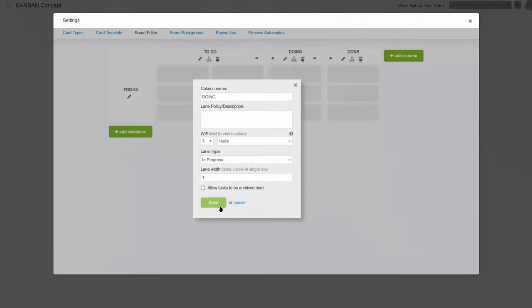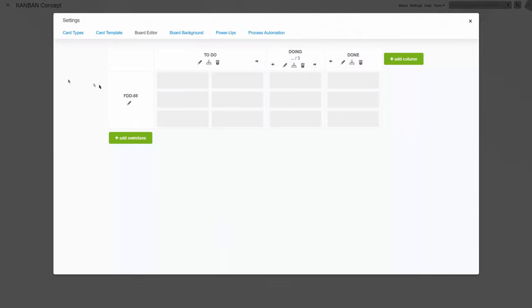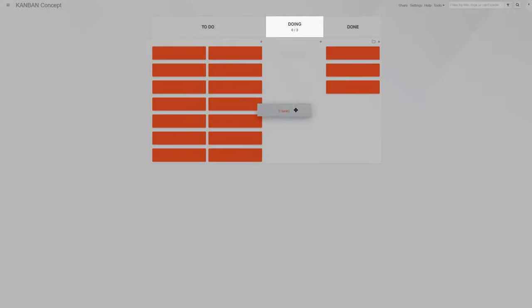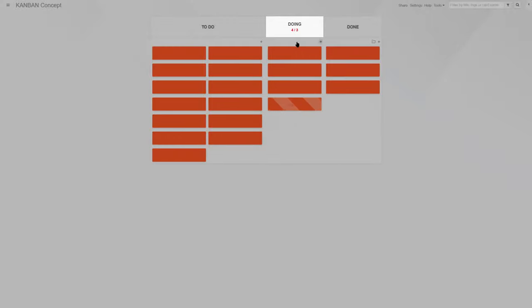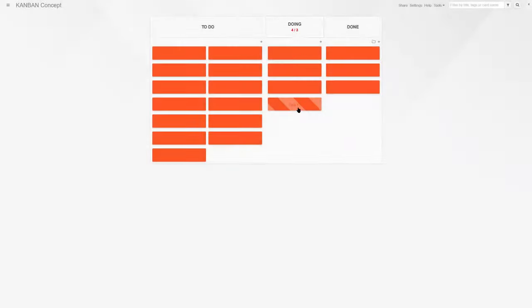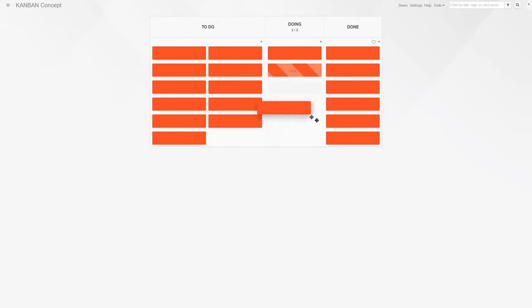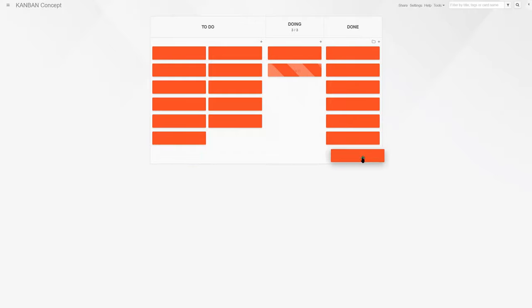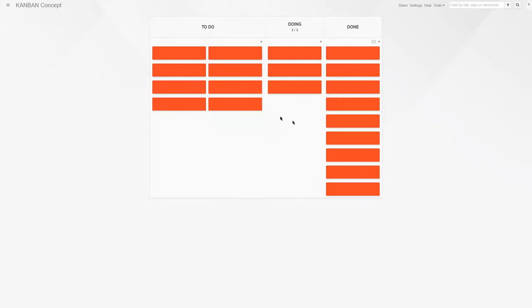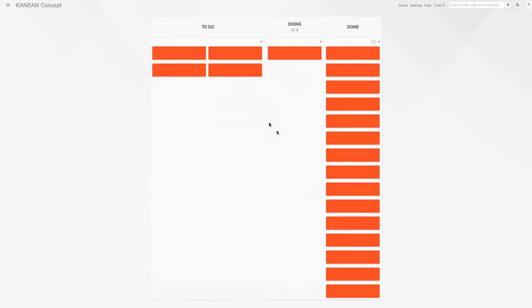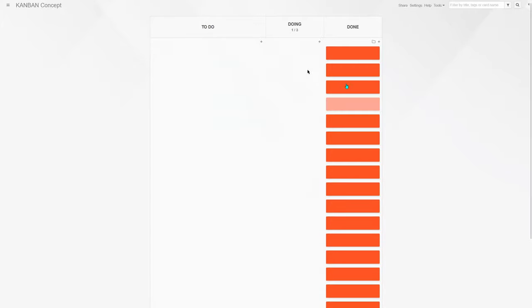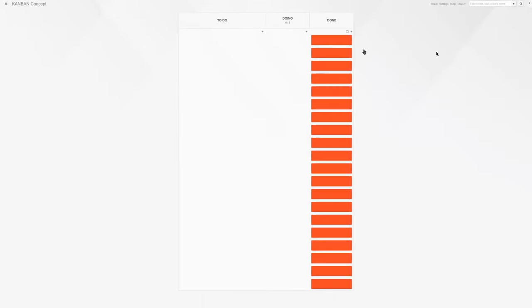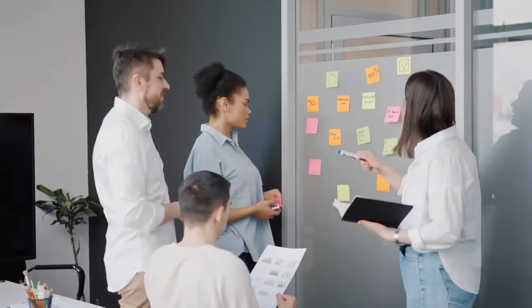Also, a core aspect of Kanban is work in progress limits. The team agrees on how many tasks can be worked on at once in each processing step, ideally keeping the values as low as possible. Transparent workflow visualization informs everyone about each task's status in real-time, while limiting WIP speeds up the completion of individual tasks and improves the team's ability to focus on the job in front of them.